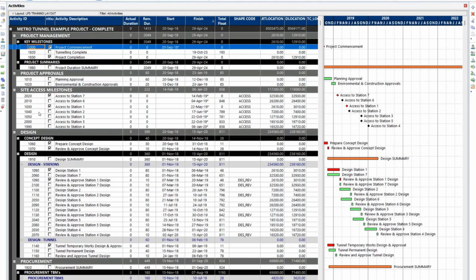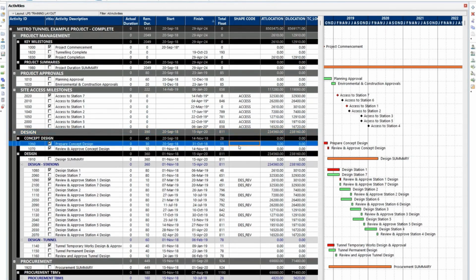What we can't do in Primavera is, if you've got a grouping band, and in this case I've organized by WBS, but if you organize by an activity code, for example, that is not actually an object in the schedule. So we can't pick up the dates of the grouping band as such. Whereas obviously if you have a WBS summary or a level of effort task, then it's the same process. You assign a shapecode value and assign the chainage values, and it will be available for importing.